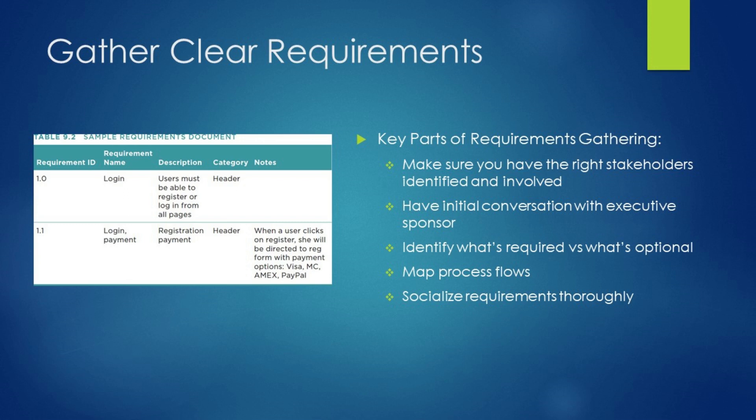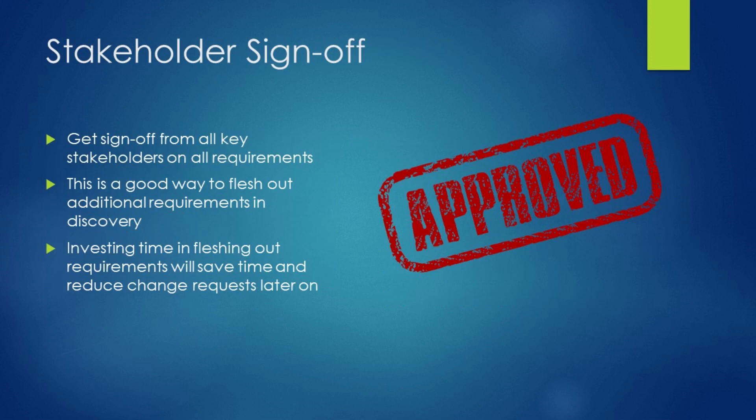Continue socializing the requirements until you're confident they have been fleshed out fully, giving the scope of your project a solid foundation. Number 2: Stakeholder sign-off. After you've fully fleshed out a project's requirements, another good way to prevent scope creep is to have all of the project stakeholders sign off on those requirements.